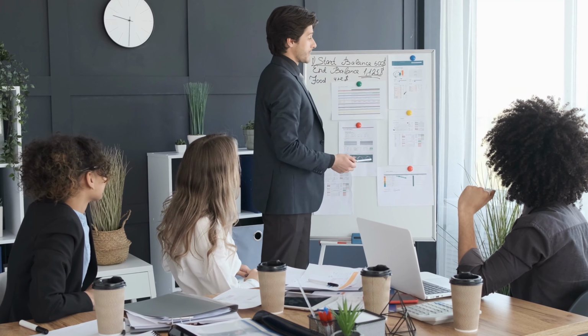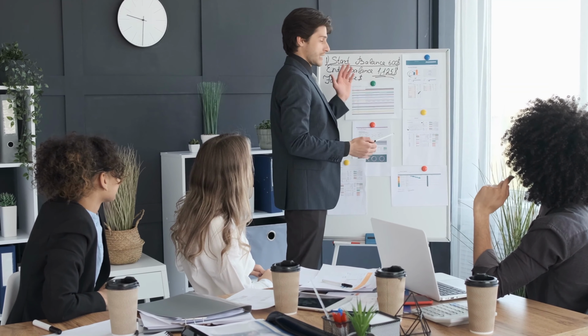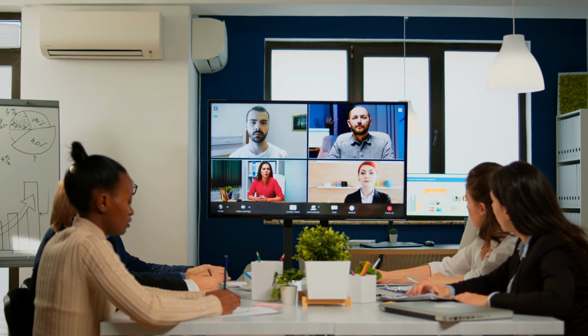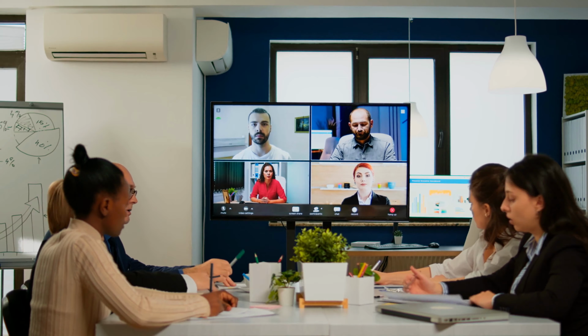So how do you do it in practice? You plan a meeting, you gather your whole team in one place, in one Zoom call, and you want to cover just 3 things. First you ask them what went well, then you ask them what went wrong, and last but not least you ask them what they want to continue doing no matter what.